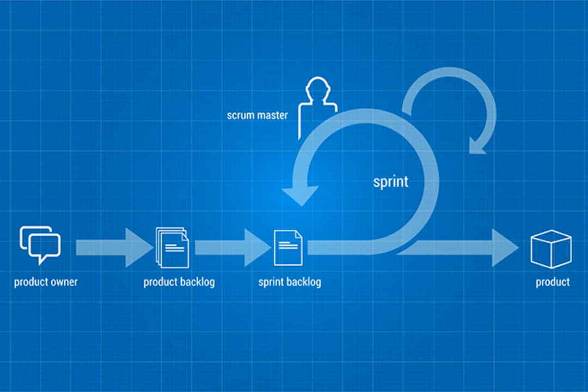If the answer is yes, we work with them to say: if we're going to include these new user stories, something has to be pushed out of scope — because overall we're trying to hold scope to the 100 story points we started with as our baseline. They understand that in order to include something new, they've got to push something to lower priority. And if we operate faster than planned and get more work done than originally expected, we may still do those original stories — but in some cases things do get moved out of scope.